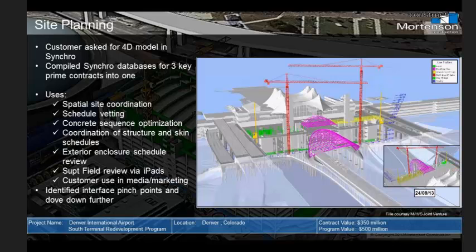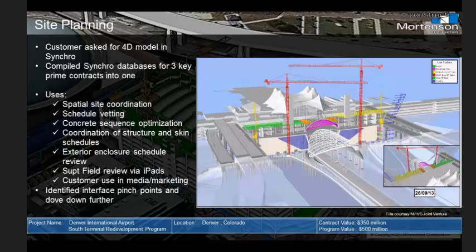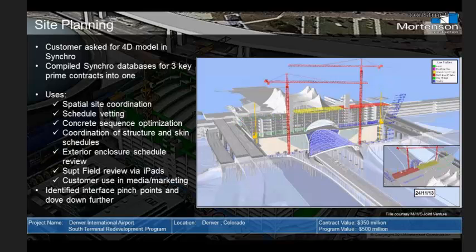So this project is set down in a 60 or 80-foot deep canyon here. So these roads are elevated by 60 or 80 feet. So this is a giant slope, and the only access going into the site is under these bridges or down through this little narrow valley here once this light rail extension starts. And so we've used this to coordinate how we're getting materials into the site. We've used it to help locate where our cranes will go, what types of cranes go in here, and so on.